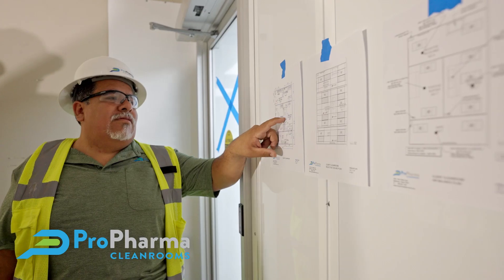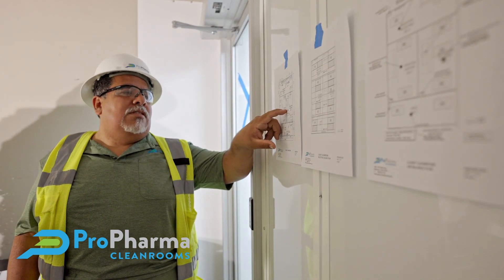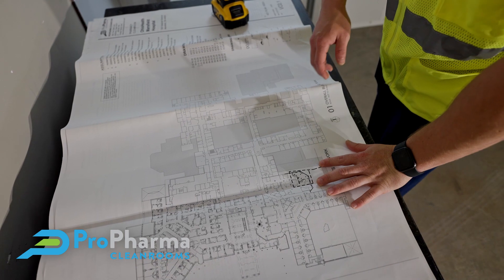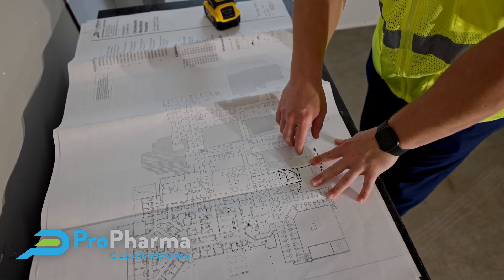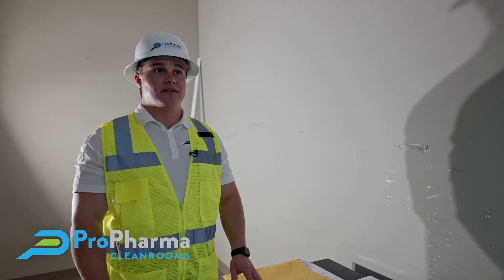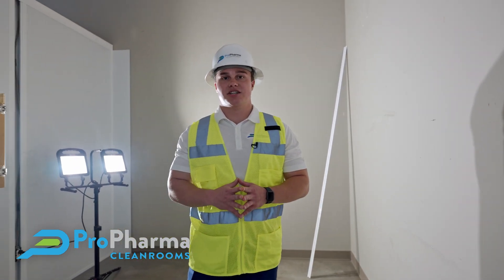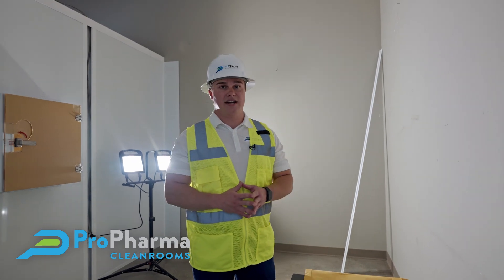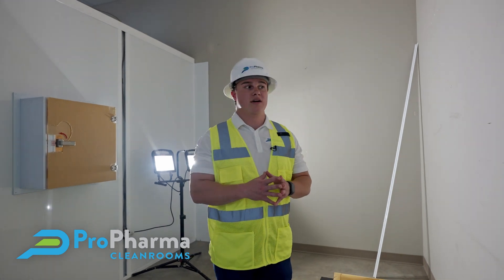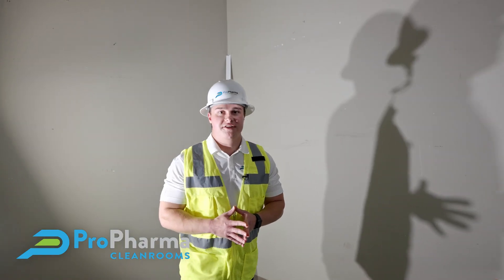Before we come in, we have a checklist that we send to the general contractor specifying what we need before Proforma's scope of the project can start. As you can see on these prints, we're given a massive facility and we're only one little piece of it. There are a lot of things that come into play when planning and designing our scope. That's why we do a site visit and check the dimensions of the white box, the duct work, and the electrical rough-ins — because it's very important that the right power and right air flows go to the proper equipment we're going to spec. Follow me, we're going to check out phase two.